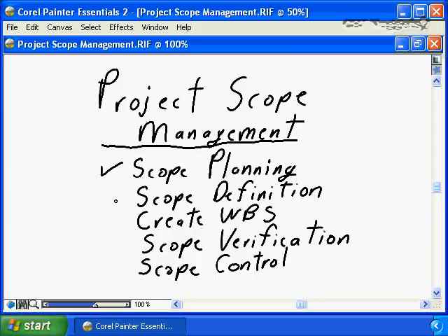Once we understand the level of scope planning required, we go in and define what the project scope is. We define the boundary, we define what is in the scope of our project with sufficient detail that is clear and unambiguous, and we define what is not in the scope of our project. We define what we're not responsible for, and we define the interfaces between the boundary. What passes through our project boundary, what are the inputs and what are the outputs that our project must be capable of supporting, and then we produce the final deliverables that will be required to satisfy the scope definition.